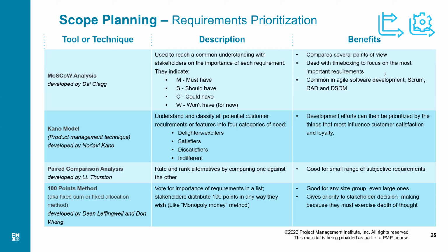Anyways, so you are all given $100, for example, or 100 points, and you are supposed to vote for various requirements, and you have a total of 100 votes. That's it. You can give 2 votes, 3 votes to a requirement, or you can vote 0, or only a 1, or maybe a 10. When you have exhausted your 100 points, your job is done.